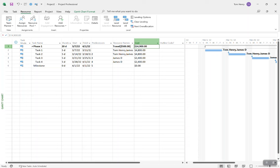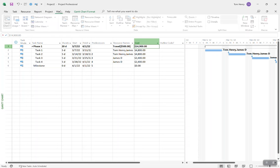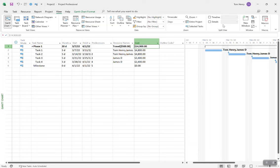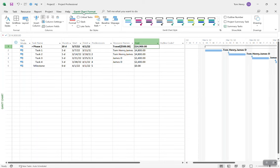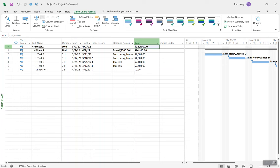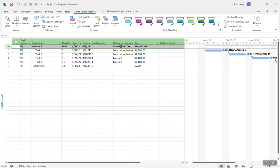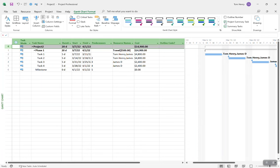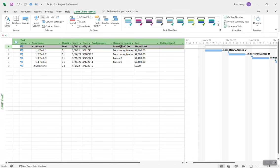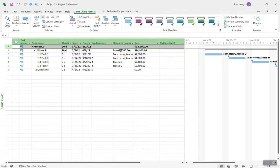In Microsoft Project, if you want to find out the cost, right-click and insert the Cost column. You can see exactly how much each task is costing and the overall rollup to the phase. Travel is $500 plus the resource assignments rolling up to $15,000 for the project. To see the Project Summary Task, come to Gantt Chart Format and check Project Summary Task — now you have a project line. You do not need to create a project summary task manually; it's already there, and it keeps your work breakdown structure outline numbers accurate.